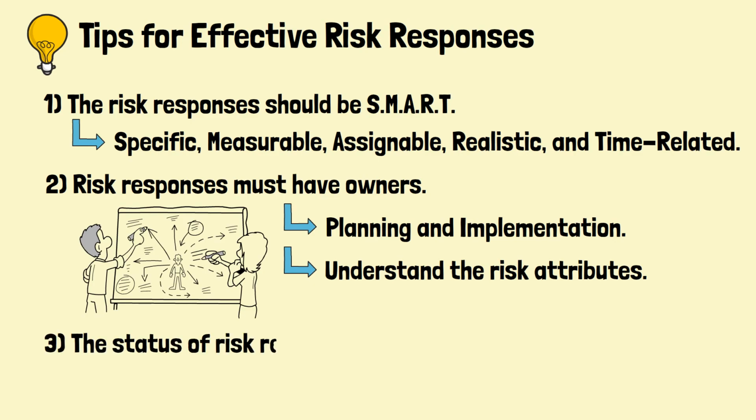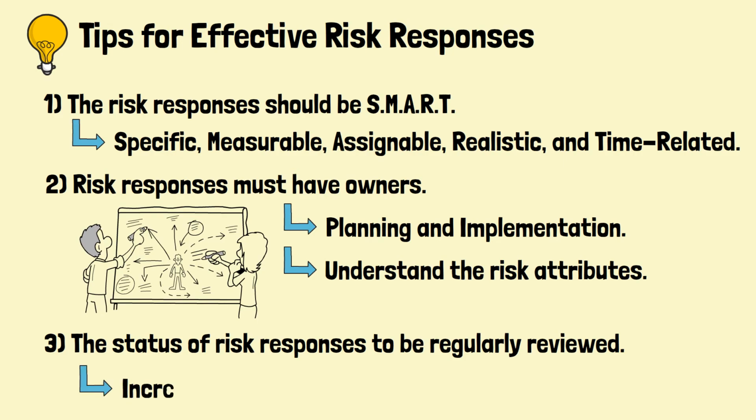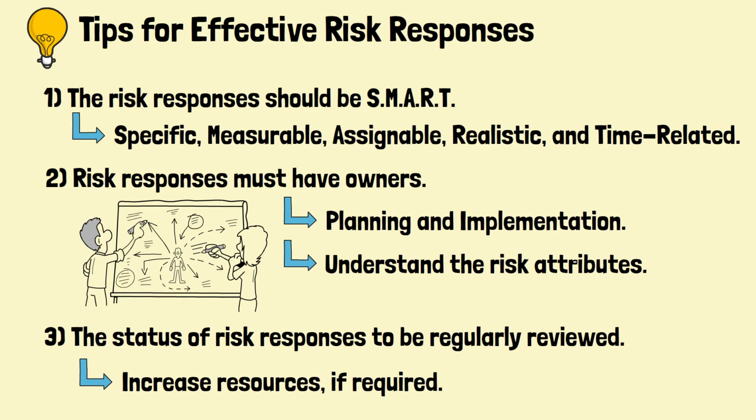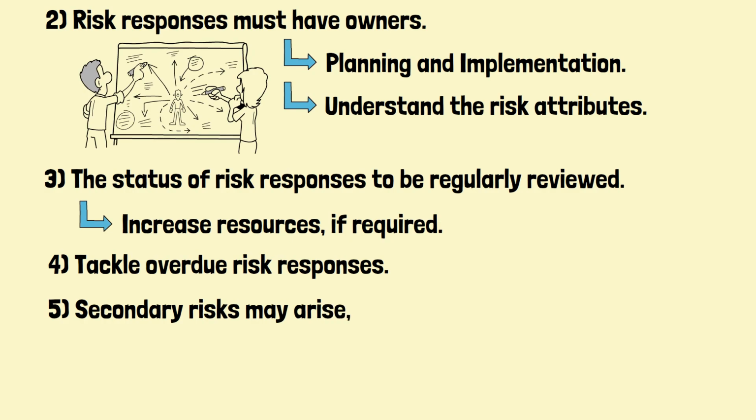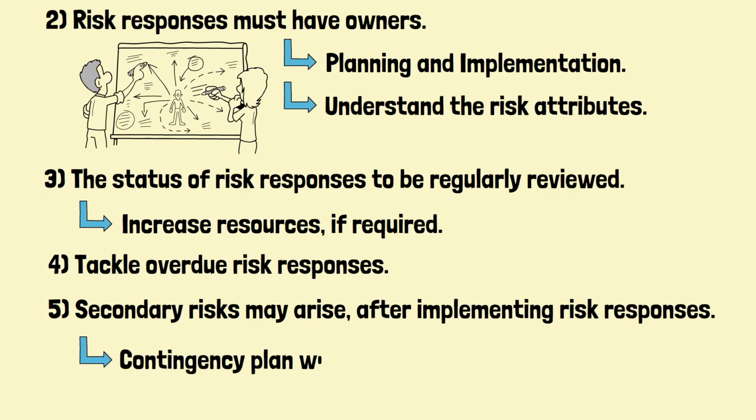When the risk responses are being implemented, their status should be consistently reviewed. The risk focal points can suggest to increase resources if the responses start losing momentum. Any overdue risk responses must be seriously addressed. The risk responses sometimes could trigger other risks, which are known as secondary risks. Therefore, contingency plans would need to be put in place if the secondary risks are foreseen.